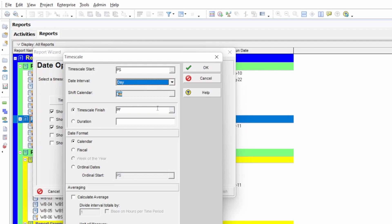The reason daily is preferred: when you compute plan percentage based on weekly or monthly intervals, Primavera gives you values at the end of the week. But if your report is generated mid-week, the plan percentage shown in the updated program will not match the value shown in your progress curve, since the progress curve shows values at week-end. This causes confusion — consultants may comment that plan values in the progress curve don't match the program. Using daily values avoids this issue.